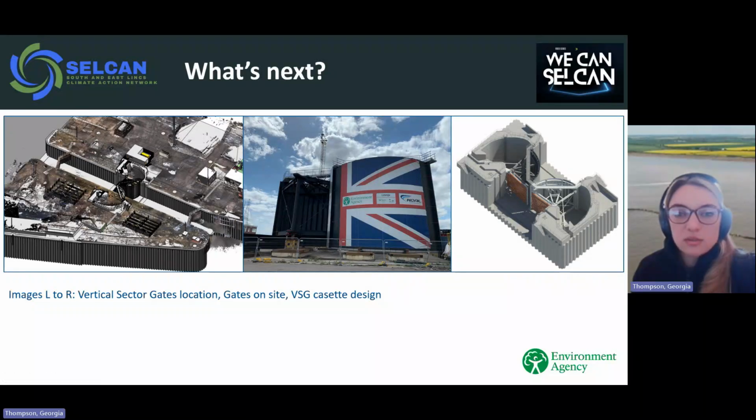The vertical sector gates have already been constructed and are on site ready for when work commences. We know that the second phase of works is vital to keep up with future climate change predictions. But whilst it's not imperative that the work is completed now, we've chosen to deliver phase 2 alongside phase 1 to avoid prolonged disruption to the local community, who have been extremely patient whilst the works have been completed. At present, we're considering the best approach to ensure the completion of it, but it should be starting in the next year.